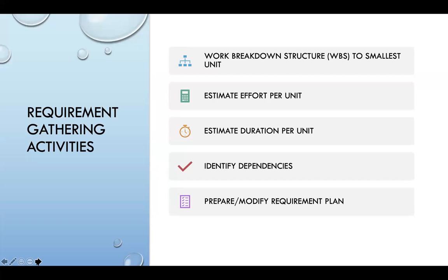So, the gather requirements activity. We've talked about all these things, but here is a typical structure. We have the work breakdown over here down to the smallest unit. You take a look at every requirement. We have some requirements, some features that are big, and then we break them down just like that, right? We call this a WBS, work breakdown structure. In project management, if you're taking the PMP exam, you will encounter some of these things in the work breakdown structure.